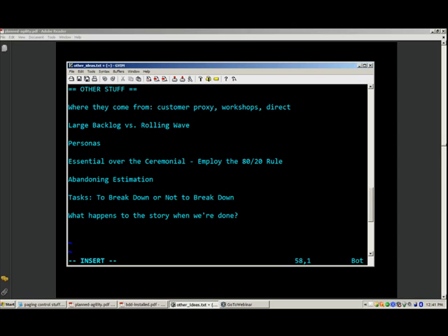keep what's called a rolling wave. If you Google rolling wave planning, the first hit that comes up is a really interesting white paper about this notion, and this is what we do at version 1. We take a small stack of stories, maybe 1.5 iterations' worth, and we estimate them. And we don't waste our time estimating stories that may be ripped up, may be invalidated, may be duplicated. If you have a large backlog, you're going to end up with a lot of waste due to duplicated stories or invalidated stories. So why expend the effort of estimating them?